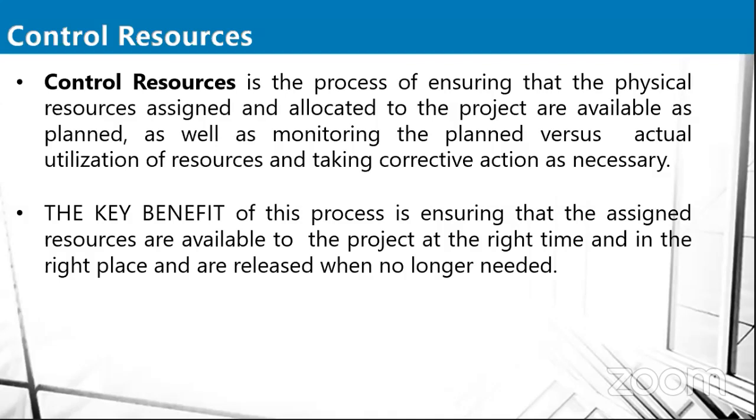So now the key benefit of this process is ensuring that the assigned resources are available for the project at the right time and in the right place and are released when no longer needed. You understand? Now, those resources should be available at the right time. Very important. If you don't provide those resources at the right time, it's going to affect your schedule. It's going to affect the timeline for the completion of your project. So you must be able to have those resources at the right time and at the right place.